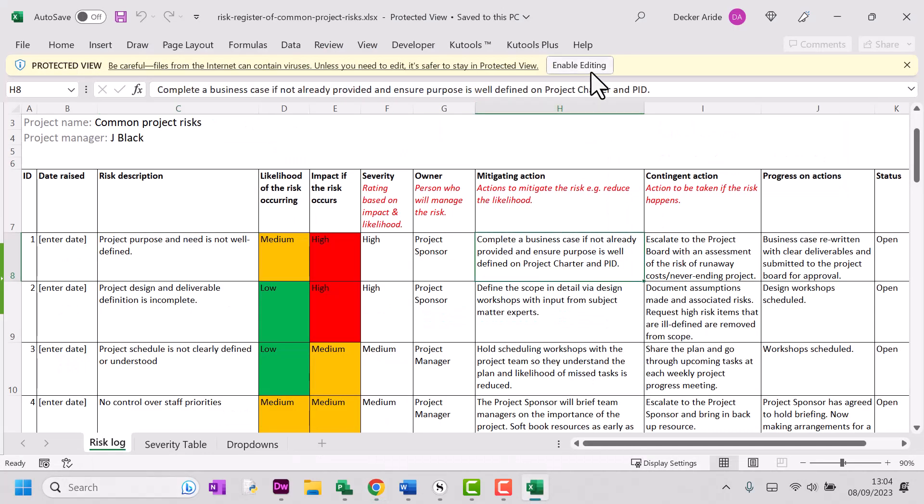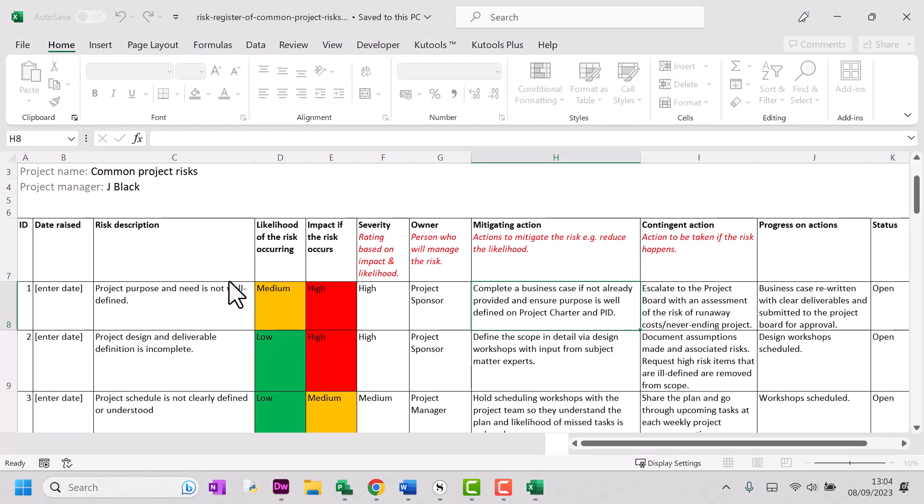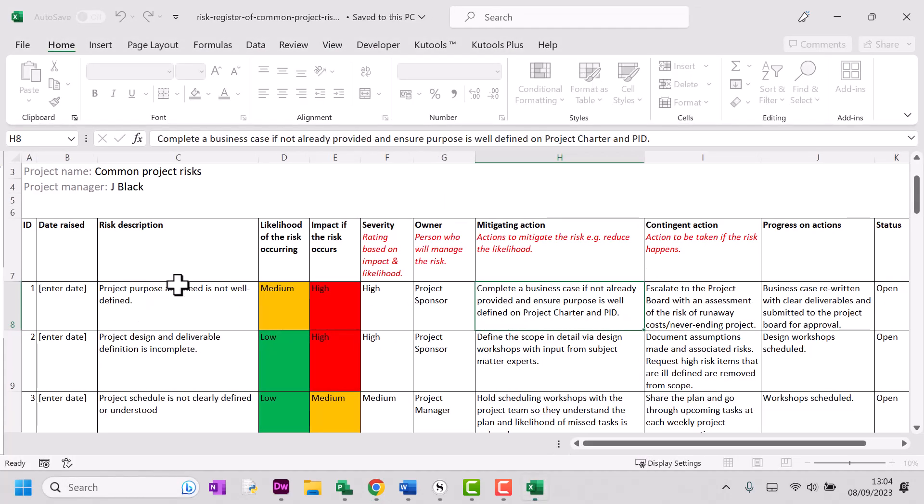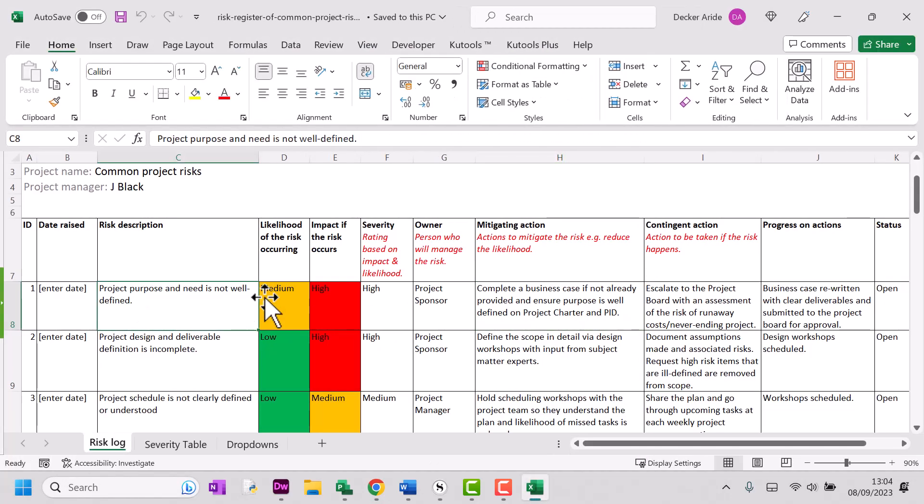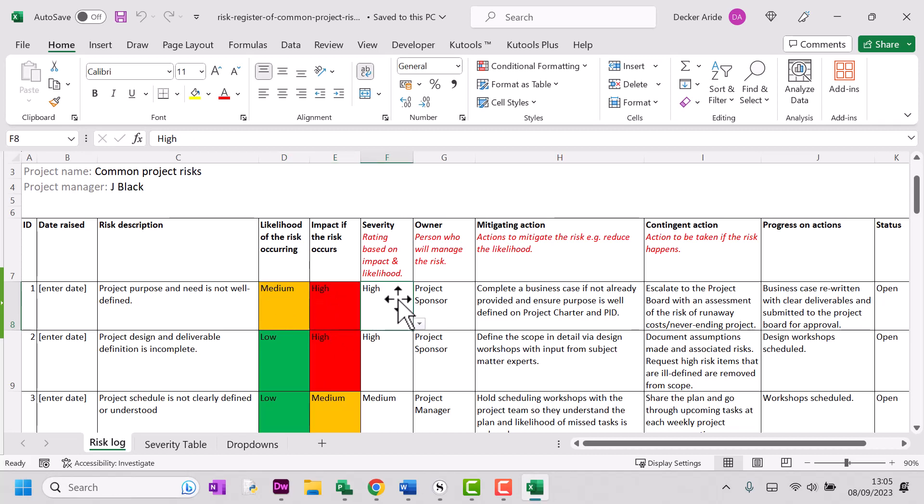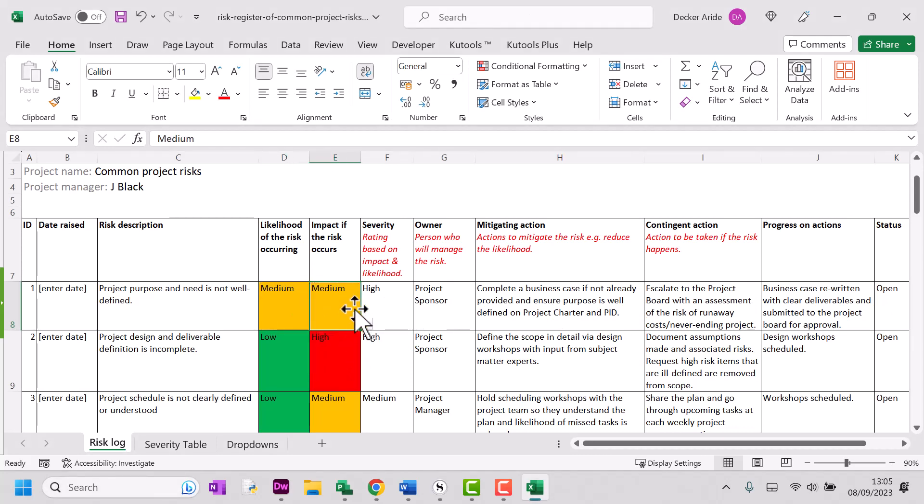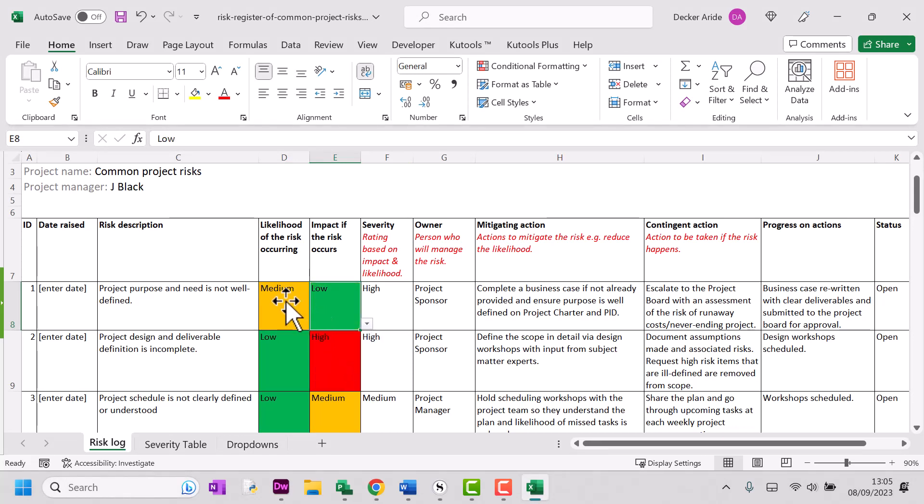And here's my risk register with all of the project risks pre-filled. You can see that we've got a drop down list here for selecting the likelihood, impact and severity of the risk. And we also have some conditional formatting, which means that the color of the cell changes as we change the impact, severity, or likelihood level.